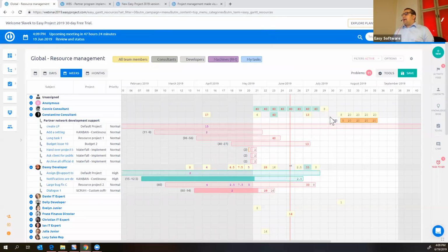And that's done, okay? So now if some new customer projects come and I would need Konstantin to work on this project, everybody who is working with the resources now knows that Konstantin is half booked in the whole of August, so I have to take it into consideration in my planning. So these reservations allow you to really quickly and simply work with the occupation of your people even without having a project fully planned. So that's one of the innovations, reservation.